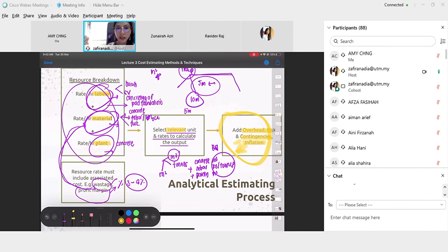So if your project is a small school, just one block, for example, your project will be done in like 1 year probably. Usually we don't make a lot of allocation for inflation because there's no time for inflation to have an impact. But for a mega project, let's say PNB 118, or KVMRT, whose project is long and has several phases. For example, KVMRT built the Damansara line first, then the Sungai Buloh line, and whatever line they want to do.